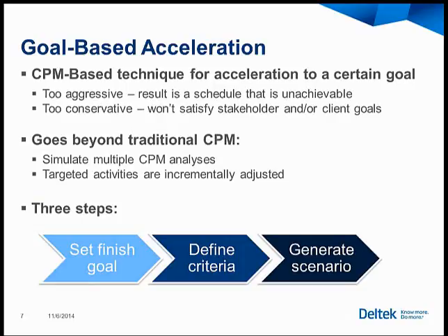But it really does, that kind of approach is actually often used to accelerate projects. And let me tell you how. I've been asked a number of times after I've built a schedule to hold reserve on the schedule. And we did it one simple way. In fact, I wrote a macro for it. We took 10% away from every activity, 10% of duration and potentially resource time away from every activity on the schedule. The schedule calculated to an earlier date, usually about 10% sooner.